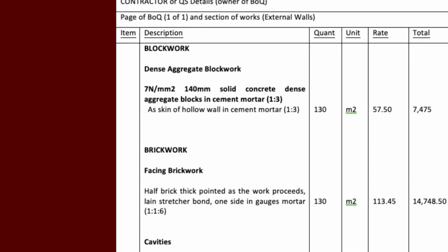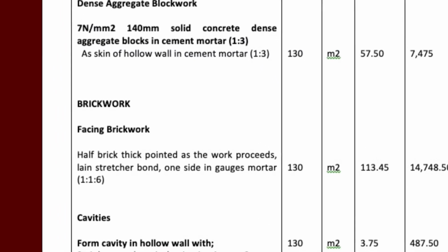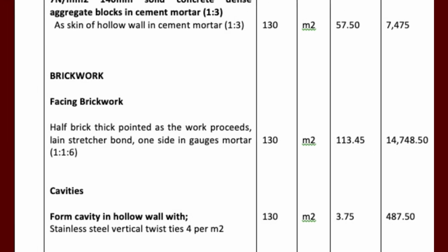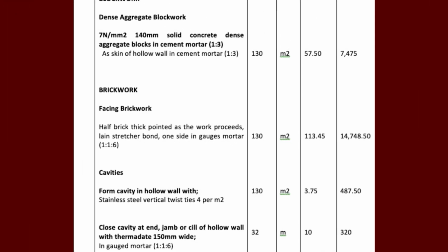The BOQ is bill of quantities, which will define the quantities of the work to be done. For example, if you have to get a wall built, the BOQ will exactly tell what kind of wall is required, whether it's a block wall or a brick wall or a concrete wall, and what is the length of the wall, the height of the wall, the width of the wall. All this information is given in the bill of quantities, or in other words, specifications. So these elements, the drawings, the BOQ, the conditions of contract, will define your scope of work.